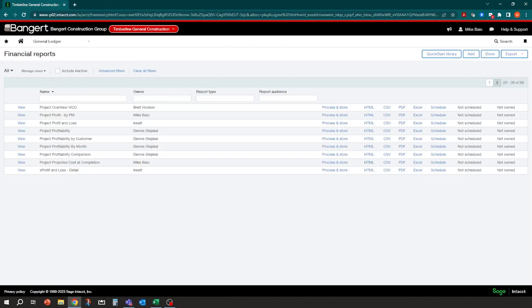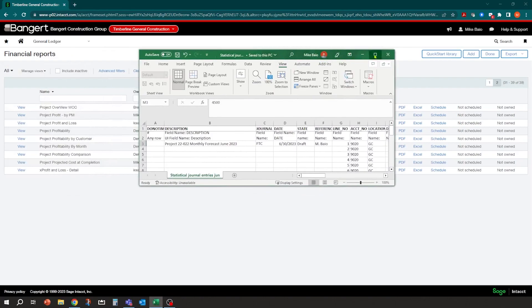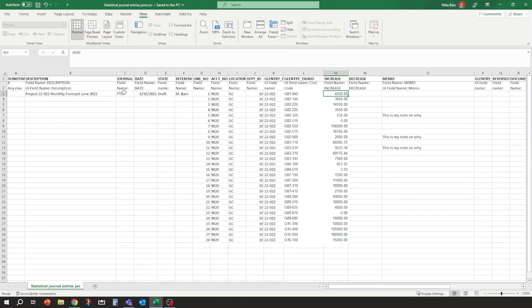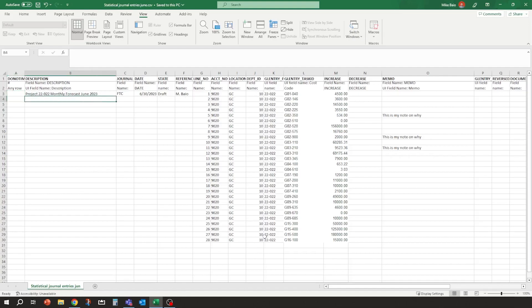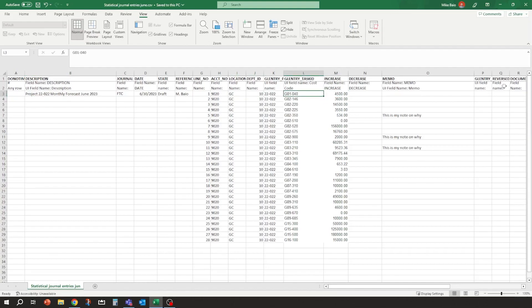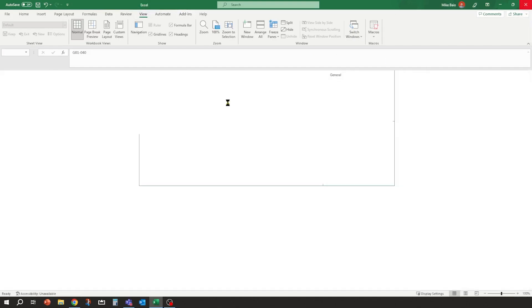So I'm going to close that. And so again, just to show you what I'm basically, here's your default template. It's very easy to set up. Once you set up a template, you can have rows that are for your comments only if you don't want to import them. But basically this is your standard import cost code, amount. If I needed the cost type, like labor material, I would have another column for that. I have it over to the right right now, but basically you can put in your projections here and then we can import this into the system. So I'm going to close that up. This one's labeled journal entries, June. I'm going to close that up.